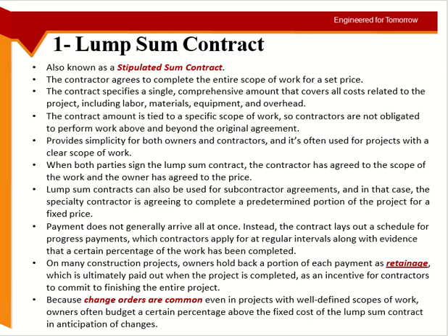I need the project to run my work and I need my office to hold my company, right? So whatever expenses you are doing with the office, the electricity, the rent, the cleaning, the computers in the office, they are all part of the same company. So some part of this cost will go to the project as well. I'll put it in the project because I have to recover from the project. This is my only source of income. So this is also part of overheads.